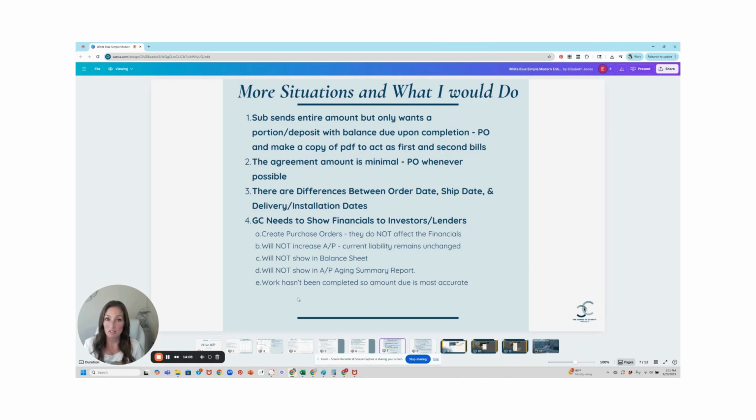If we do have a due date for the remaining upon completion, if it says 80% due on October 13th, then I will go ahead and create that second bill to reduce the purchase order down again and put that second due date, because it would have 2 separate due dates. So it needs to be 2 separate bills, but we want to make sure that we track the full amount that he has agreed to.